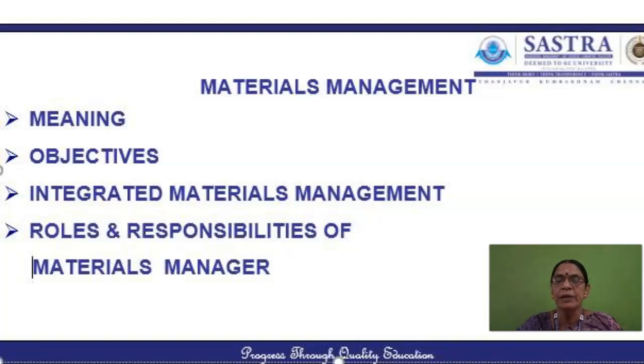We have a limited tender, or closed tender, wherein only a small number of suppliers will be selected. They will be given the specifications, the quotations will be received from the suppliers, and the purchase manager will evaluate the different quotations. At times we will have a single tender, wherein the tender will be issued only to a single supplier. Normally in economics we call it monopsony. We will have a single seller and a single buyer. A single tender will be issued only to a single supplier, and the single supplier will give the quotation and that quotation will get accepted.